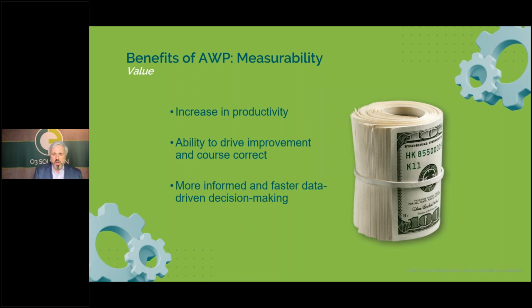You often do not know that a project is completely off the rails from a quantities installation S-curve until it's too late to do anything. But you can very early on identify and recognize a challenge with the health of the IWP process, and as a leading indicator, you can step in, make decisions, and improve that process and correct it before it becomes too late and you can no longer adjust.